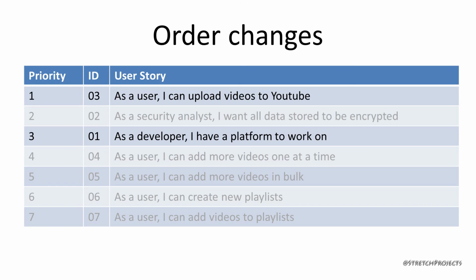And so an important point for the developers of any projects to keep in mind is this fact, that the order of things can and often does change, and they shouldn't worry too much about the order things are happening in. If a developer does feel that a story is in a very wrong order, they can feed that back to the project manager and to the product owner, but it is ultimately the decision of the product owner as to what order things happen. They are the ones, after all, who are paying the bill.